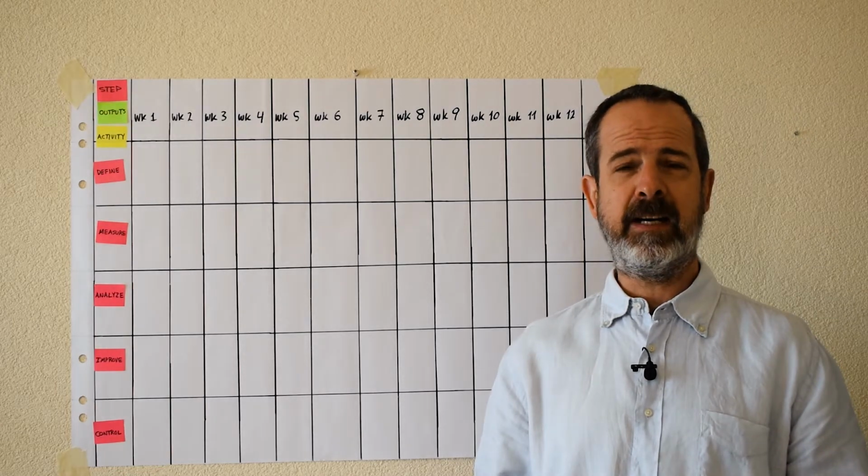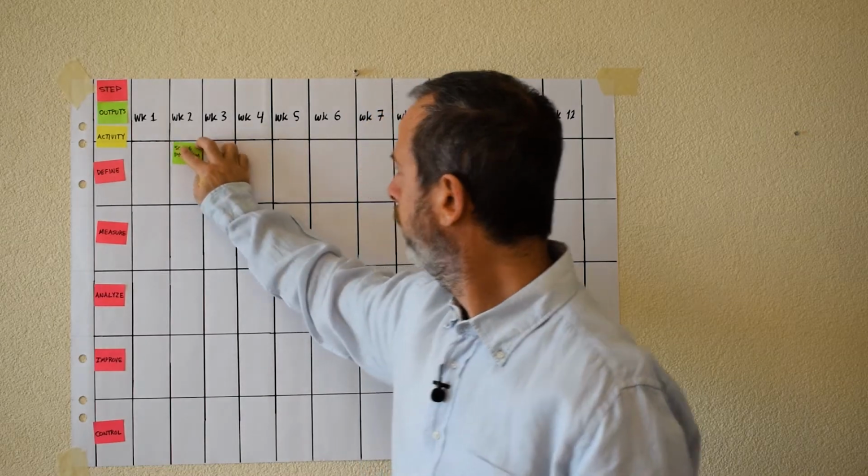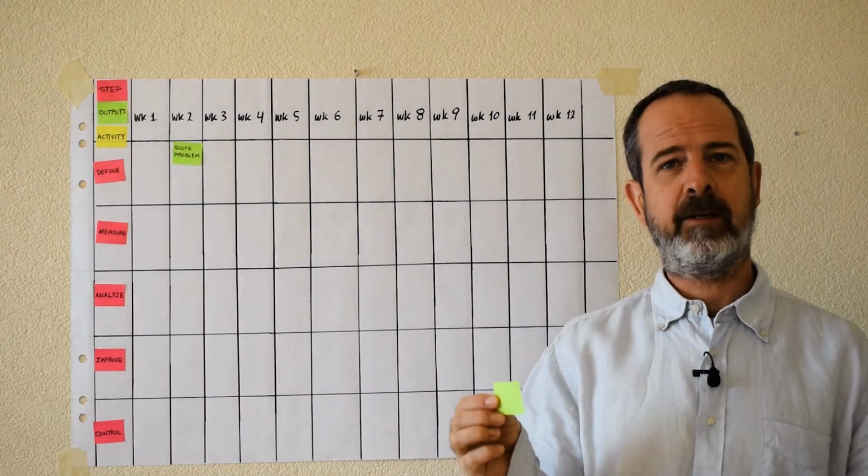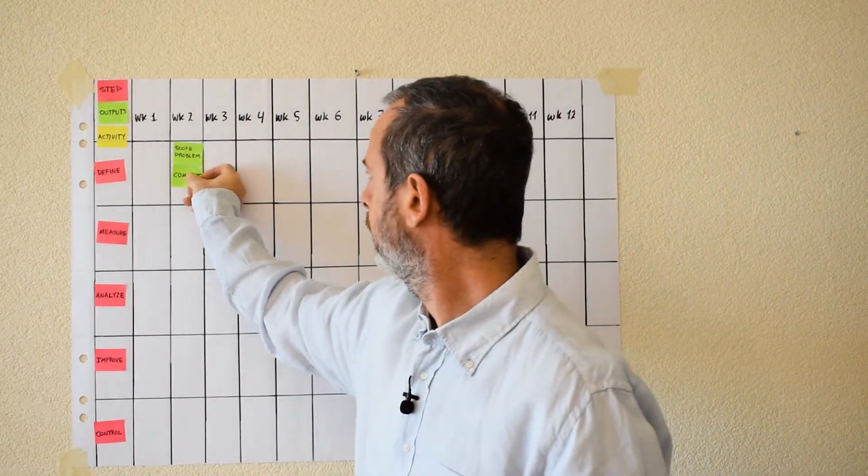After you've agreed on the different buckets, together with your team, you create a list of activities for each bucket and the intermediate milestones to check progress. The next step is to map out your deliverables. So for example, for the define step, we have scope the problem, get a commitment, and make a plan. You can find the details of this in the attached PDF.